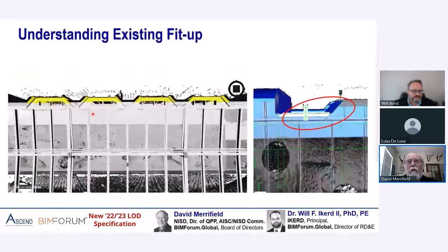The interesting thing about this is that we not only gave the design drawings to the detailer, but they had to learn how to use laser scan images to actually detail the structure, as opposed to just detailing it off the structural drawings. Yeah, and so in this one, an LOD 200 reference model of the enclosure was created.